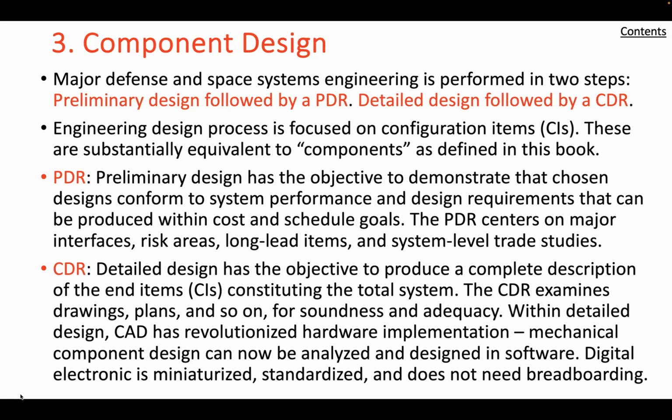So in terms of component design, the object of the component design step of the engineering design phase is to implement the functional designs of system elements as engineered hardware and software components with compatible and testable interfaces. During this phase, the system components that do not already exist as engineered items are designed, built, and tested as units to be integrated into subsystems and then assembled into an engineering prototype in the integration and evaluation phase.